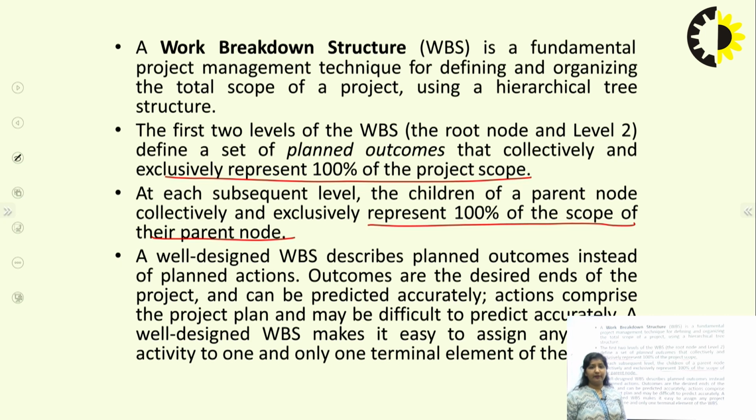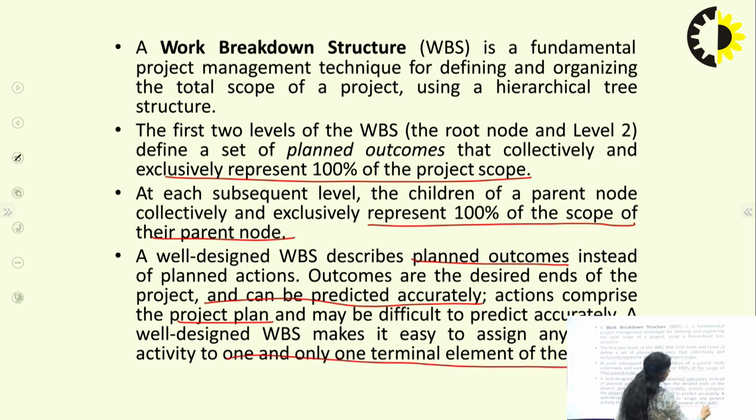So what is a well-defined WBS? A well-defined WBS describes planned outcomes instead of planned actions, and the outcomes are desired ends of the project and they can be predicted accurately. The actions comprise the project plan and they may be difficult to predict accurately. A well-designed WBS makes it easy to assign any project activity to one and only one terminal of the WBS. So this is a particular breakdown structure. From here it can be worked upon.